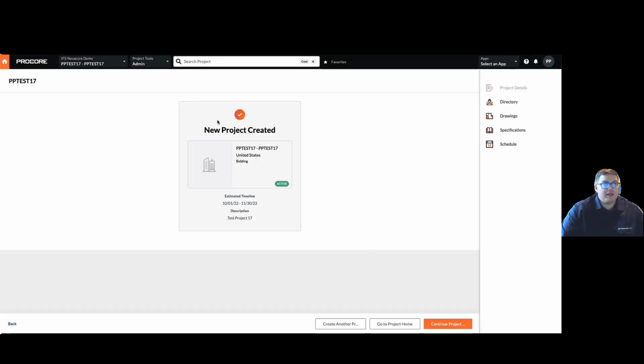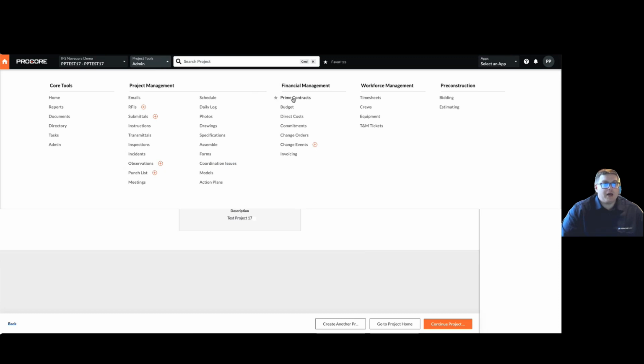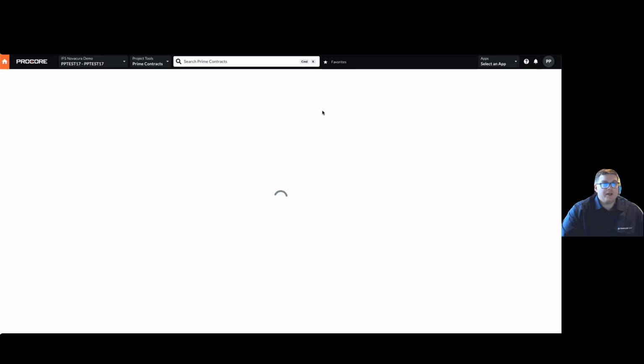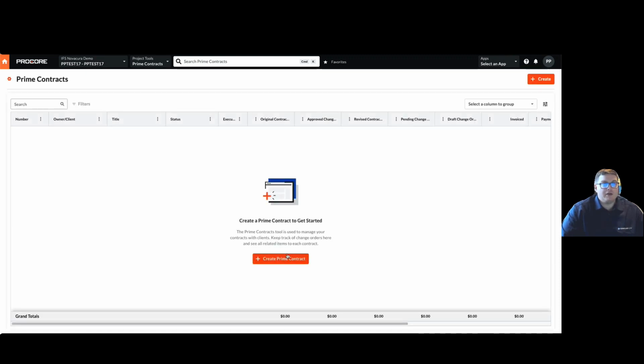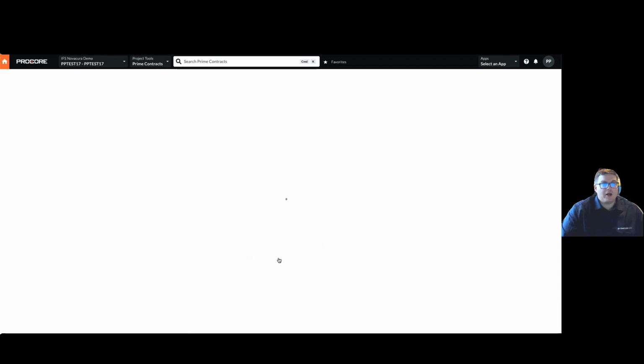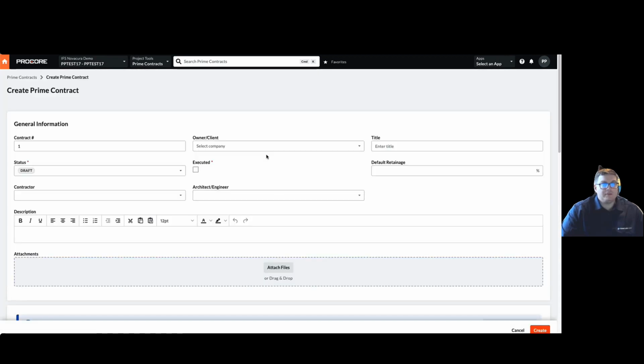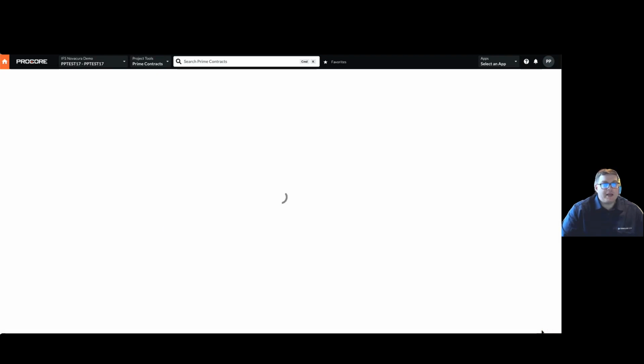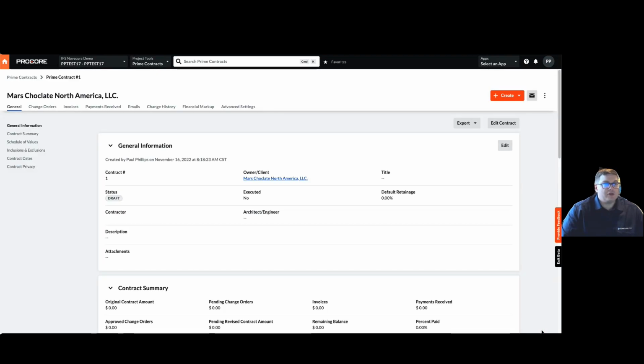Once my project is created, I need to go ahead and add a prime contract to dictate which customer my project will have in IFS. To do that, if I go to the prime contract screen, I can create a new prime contract and select an owner for this prime contract. I'm going to go ahead and select Mars and create. There's much more information that can be added to the prime contract, such as a schedule of values. But for the interface to work, I only need to dictate one owner and client for the prime contract.